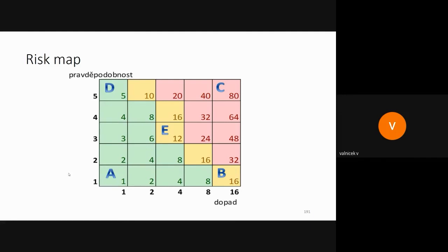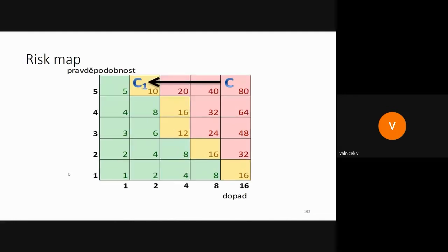We can use non-flammable materials. So definitely we can decrease the probability. But we need to decrease the probability before. So that's called preventive actions. So we have preventive actions or reactive actions.